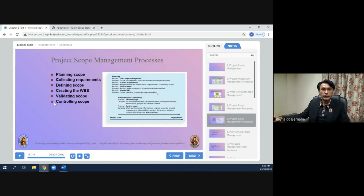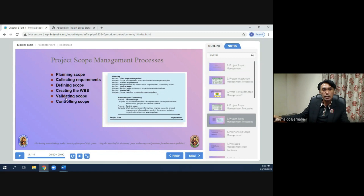In the project scope management processes, we have: plan scope management, collect requirements, define scope, create WBS, validate scope, and control scope — spanning both the planning and controlling process groups.